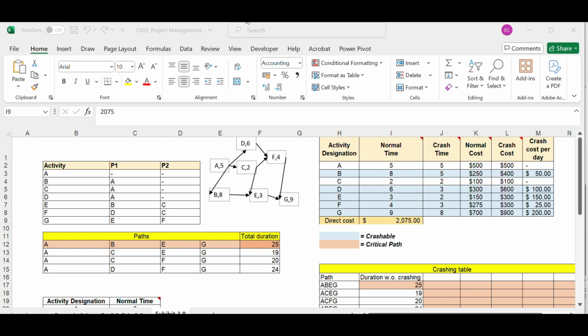Resource leveling is a solution for the availability challenge. Using resource leveling, we can delay the non-critical activity purposefully to the extent of slack. We can even out the demand and use a stable demand pattern. We can minimize the fluctuations in resource demand. We can look at the utilization from the full period or life cycle perspective, and we can adopt any method where the utilization improves. We can use the entire slack for managing the resource challenge.